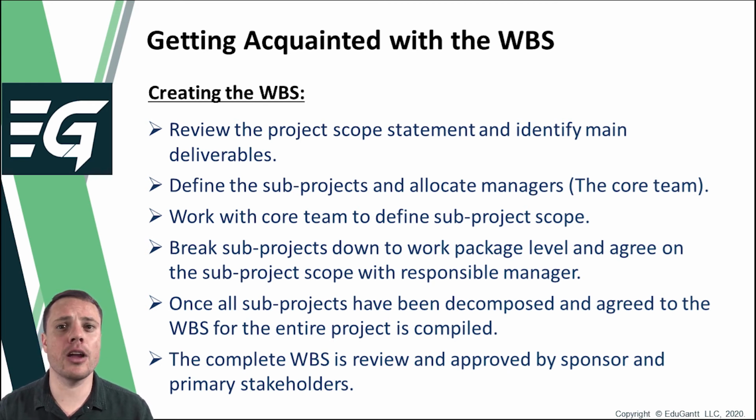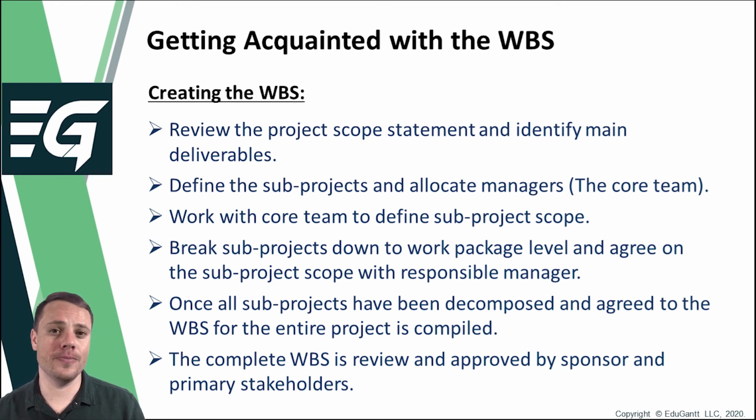Once the stakeholder engagement and review process has been completed, the WBS is approved, and together with the WBS dictionary and the project scope statement, they form the complete scope baseline, which will then be used to monitor and control the execution of the project. This baseline can only be altered or revised when a change request has been processed through formal change control channels, which we will take a look into at a later stage during the course.